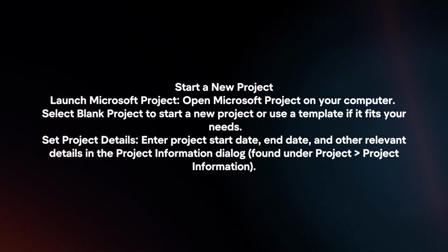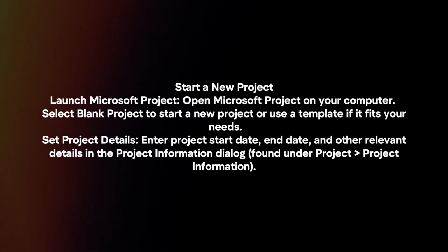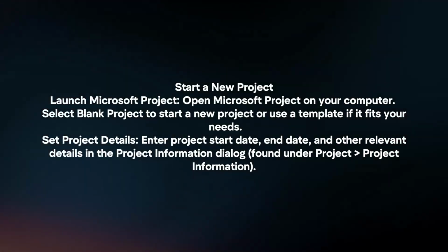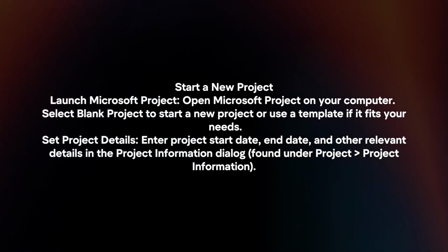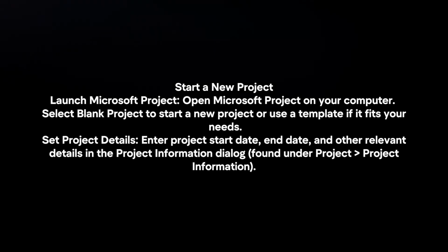Start a new project. Launch Microsoft Project. Open Microsoft Project on your computer. Select blank project to start a new project or use a template if it fits your needs. Set project details. Enter project start date, end date, and other relevant details in the project information dialog.